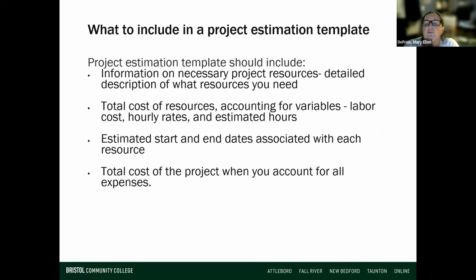At a minimum, when you're doing the project estimate, though, you need to list out the resources you need, the costs, what are your labor costs, hourly rates, estimated hours, start and end dates, okay, and then a total.